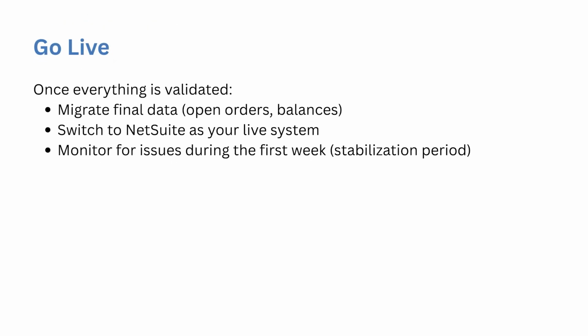After these steps, you can then finally go live. Once everything is validated, migrate final data, open orders, and balances, and switch to NetSuite as your live system. Monitor for issues during the first week, the stabilization period.